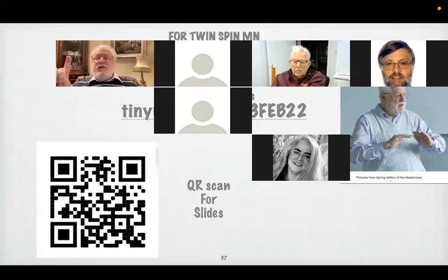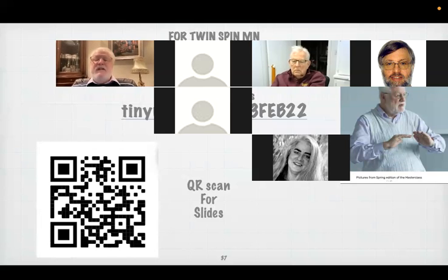One extreme simplification we did was we went to sampling rather than the old style inspection, which went through everything and tried to find all the defects. We went to sampling and tried to measure and extrapolate how many defects were there. So we could reduce the cost by a factor of about 100 to 1. We could take a 1% sample. And then we used the measures to give feedback saying, you may not exit. Compared to the original inspection that IBM and Fagan developed, this is a radical change, and therefore it has a new name, specification quality control.